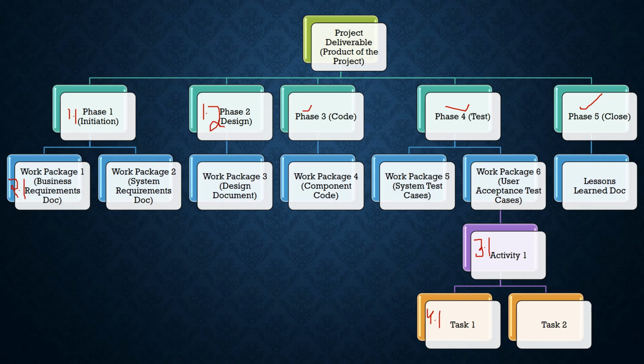I hope you're trying to understand the fact that for large projects, your WBS may go up to 15 levels, 20 levels, or even more for that matter. So this is why it is extremely important to have this kind of identifier, so that when you are writing an email or discussing something and you say, I am talking about code of account 3.1, it gets very easy for other folks to refer to the WBS and understand what you are actually talking about.